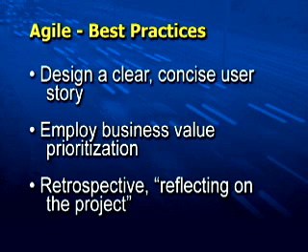The last practice, I would say, is the retrospective. One of the key elements of ongoing communication in an Agile team is reflecting on how we're doing on the project. And doing this frequently is important so we can make necessary adjustments. When you look at a retrospective, it's asking some basic questions. What's working well? What's not working so well? What's puzzling us, or what problems or impediments are we facing? And how do we actually resolve them? And I think if you can ask and answer some of those common questions on a regular basis, you're going to find the teams working much better.